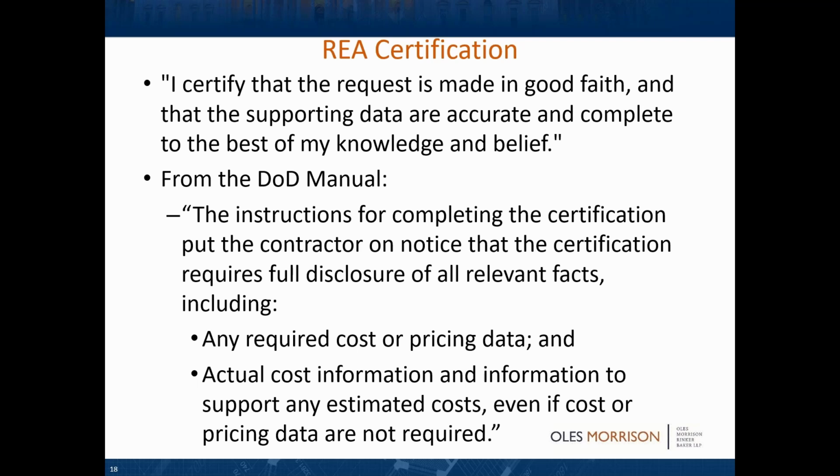What is a good REA? People ask me that. A successful REA should have a clear factual narrative, 100 numbered facts with a piece of paper or an email to back up every fact. Then the legal cases that show that you've got a legal reason under the changes clause or suspension or whatever, and then something that supports what your actual costs are. You've got to have the invoices. You've got to have the backup information all in there. That's what you need to have. And it can be a lot of work.